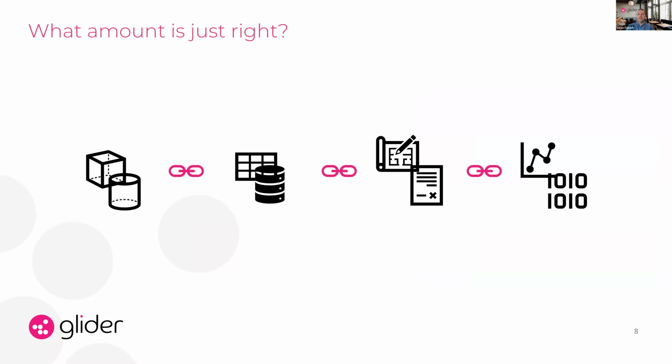So what's just right? This is the $1 million question, quite literally, because if you get it wrong, that's how much it could cost you. The fact is that all data that is needed will be handed over in some form. It could be a document, a paper manual, a book, anything. In the world of BIM and information management, what we try to do is make the format of that consistent, reusable, repeatable, searchable, etc. The least you can do is to enforce a requirement that allows you to connect the key parts of your asset, as I've illustrated here in this example.